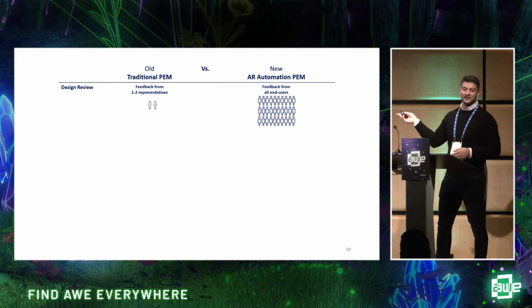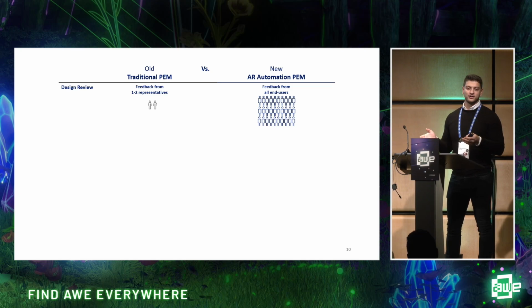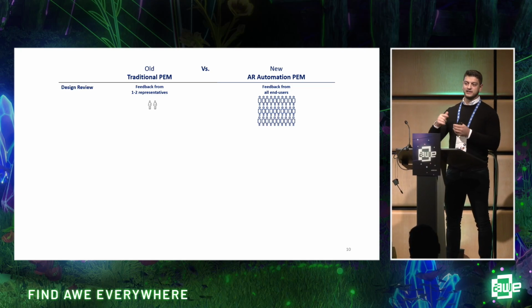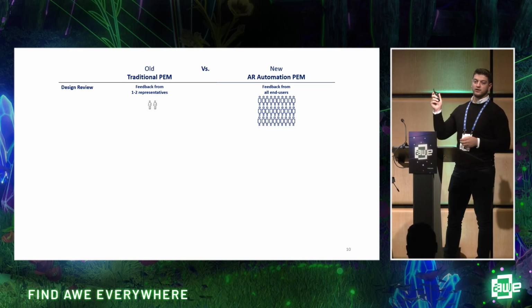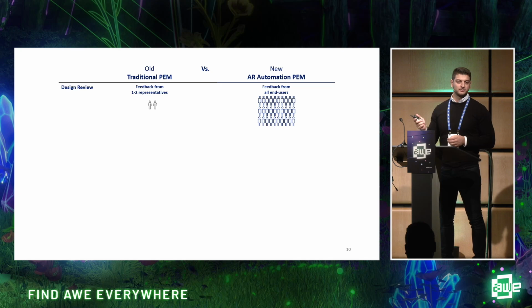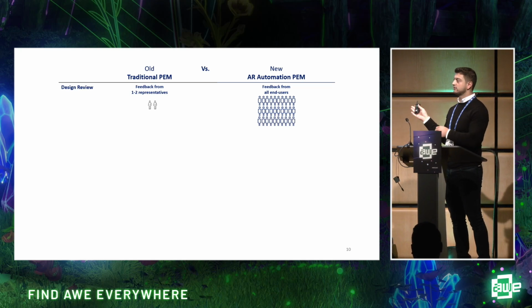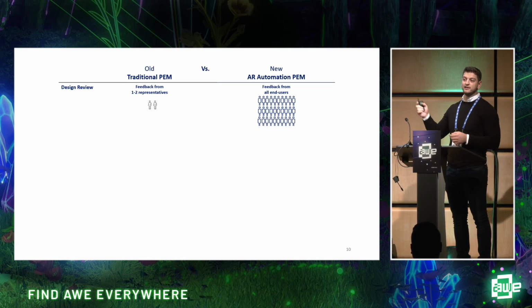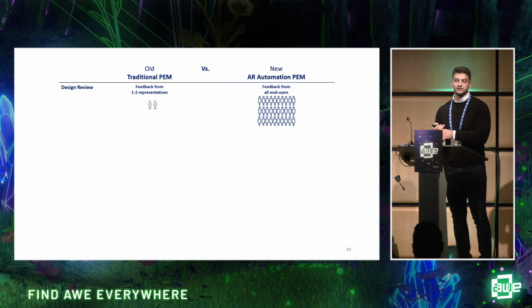In the new method, we can physically go down to the production line, and throughout the course of 1 or 2 days, taking all the shifts, within a few hours per shift, we can have everybody participate in the design review. And you actually want to do a quantitative design review, because we've seen that even in one case, the 35th person that did the design review had some unique feedback about it.